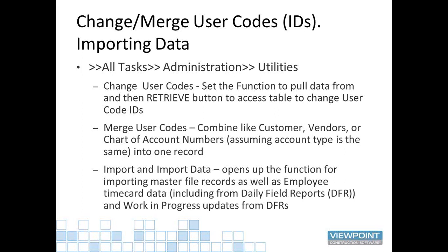Also included in what we'll discuss around the importing data is the ability to import daily field information into the payroll system for time card information to get auto-loaded as an example, or work in progress updates that could come from daily field reports to update percentages complete or units complete on specific projects.